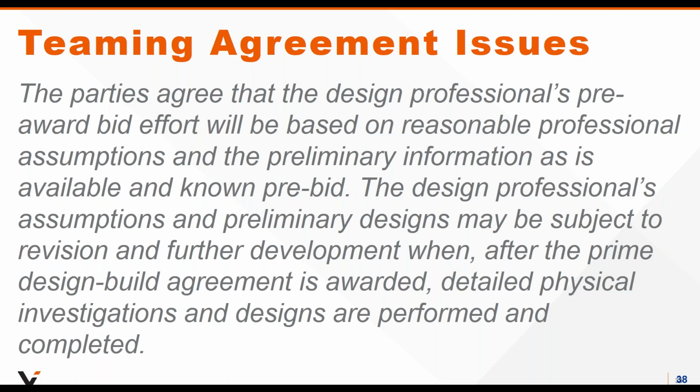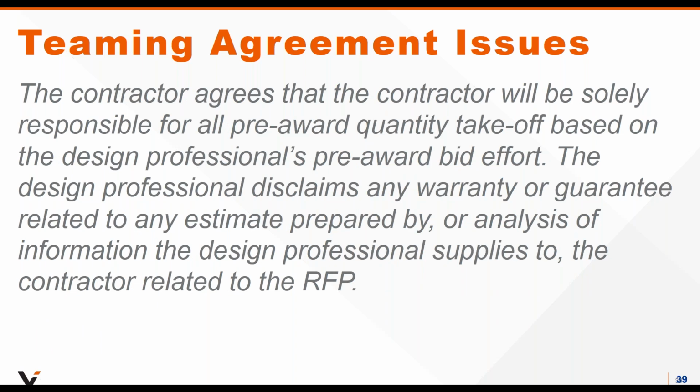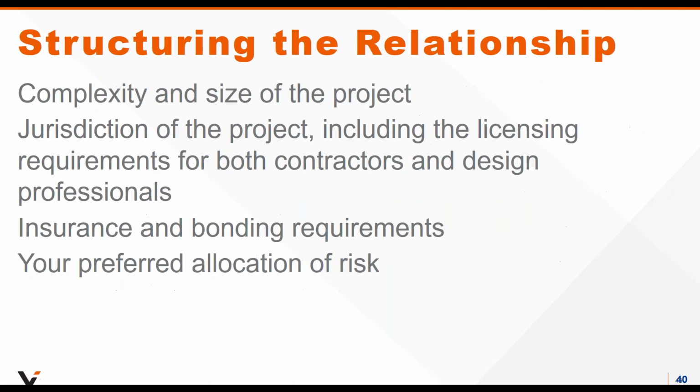And here's some standard language that you can certainly use as a resource to try to protect yourself, and more importantly, to make sure that the design builder understands that it's based off of known information that is available to you, and that there may be additional costs imposed when additional design is done, and that the contractor will be solely responsible for all pre-award quantity takeoff based on the design professional's pre-award bid effort.